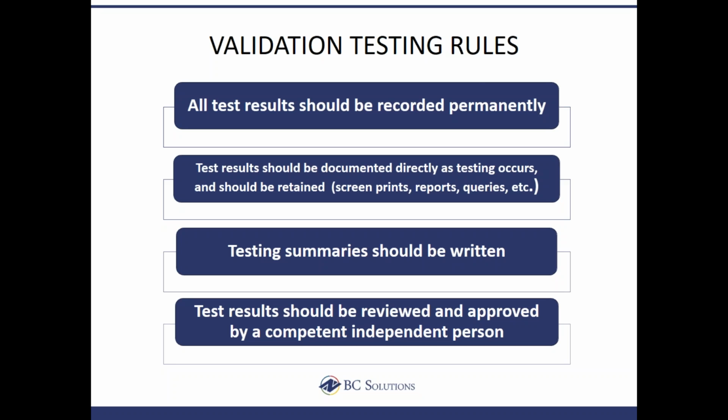There should be testing summaries written, because as someone who's had to go in and do an audit after the fact, if I can read something that summarizes all that you did, what activities you did when, what you found, how you fixed things, and then how you had change control, how your change control policy worked, I can see easily that you're in a state of control. So there should always be some sort of a summary written that explains what you did.